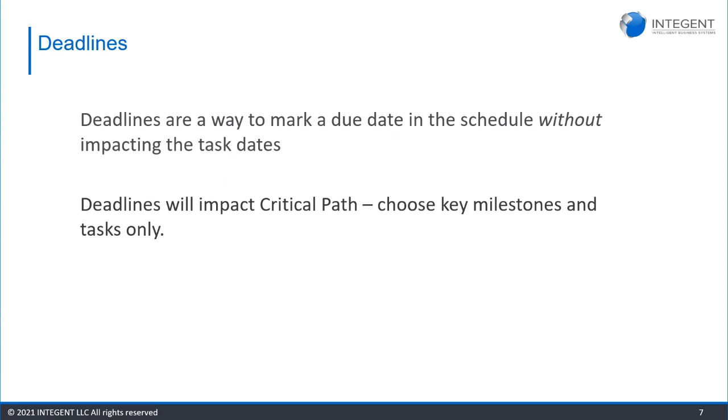Deadlines do impact your critical path. I've had some clients that say they want to put every finish date for their tasks into their deadlines because everything needs to be hit exactly when the finish date says. Well, what that will do is put all of those tasks on your critical path. So when you go to analyze it, it's going to make it a little bit difficult because everything will highlight as red. So choosing only the key milestones and the key tasks to set deadlines for will help you,